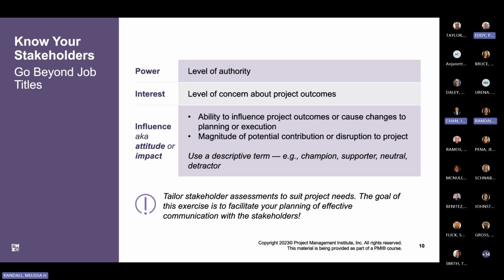And then this concerns the ability to make an impact on the project or work of the project team. And so PMI is saying you could think of that as high, medium, low, or you can qualify the influences and attitudes. I mean, in that other chart we had called out resistor, champion, supporter. So that way in that register, we are quantifying and qualifying each of our stakeholders.